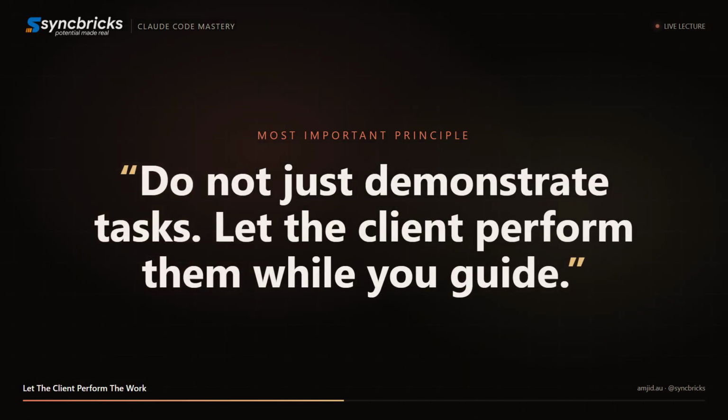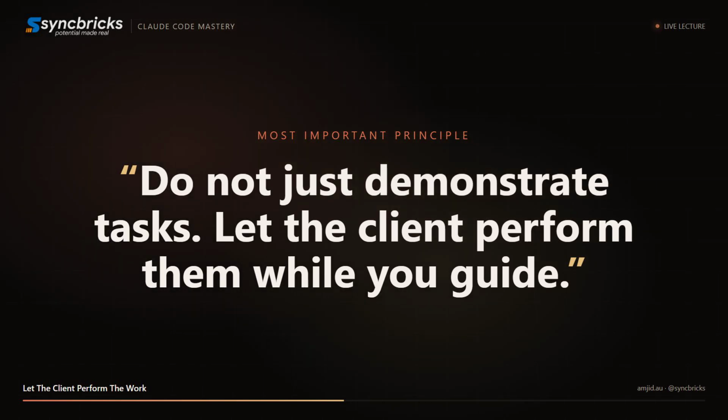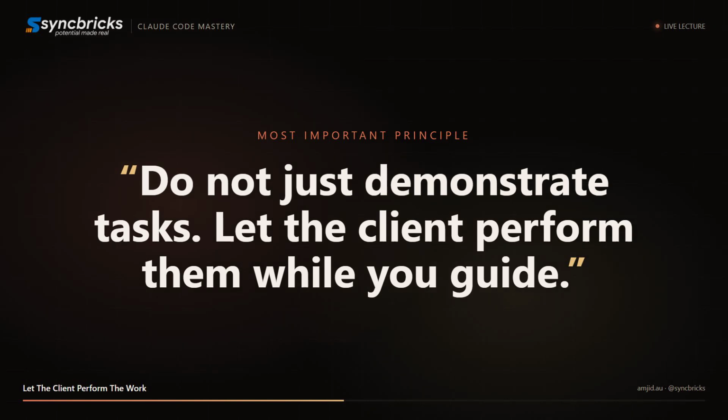Do not just demonstrate tasks. Let the client perform them while you guide. This builds confidence and ensures they can operate the system independently. Recording training sessions is also highly recommended as it provides a long-term reference.